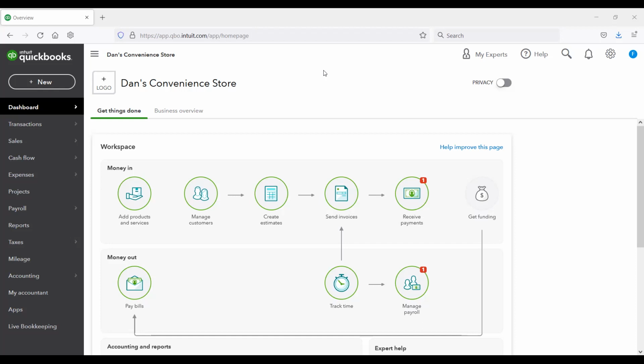It's that they know if they say, okay, it's just a minute, okay, I'll count it. Then if you win, somebody else is going to say, no, that was not legitimate because you got it 1 minute late. So we're going to sue you, and we're going to put the whole thing on hold till this lawsuit gets settled, right? Yeah. So that's why they really have to follow the rules. It's not necessarily just their own internal rules, but what happens by other people who don't win. So you got to be careful of that.